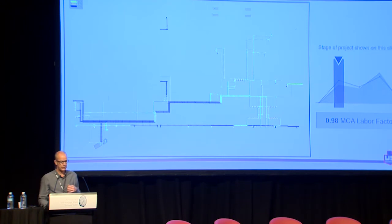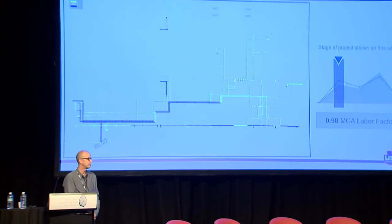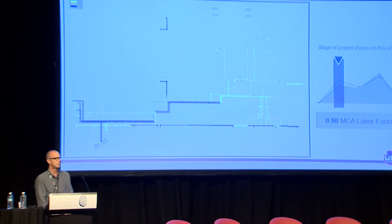So this is what's really interesting: when we get that first measurement on jobs and we're not meeting our estimate, if something doesn't happen, from my experience, it's going to continue to trend exactly what that first point looks like. I've been with our company for 20 years, and in 20 years of sitting through forecast reviews month after month after month, there's one thing I can tell you. If you don't like the trend on a job site, you have to do something or it will stay exactly the same.